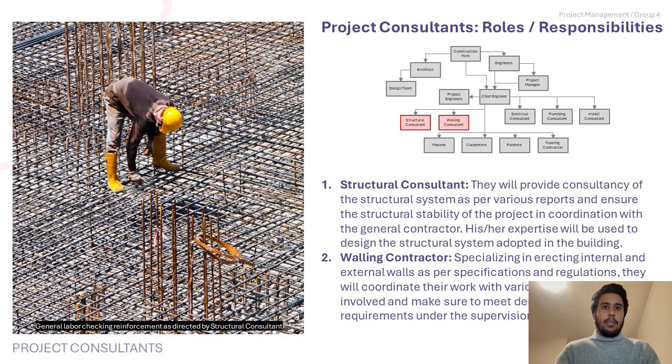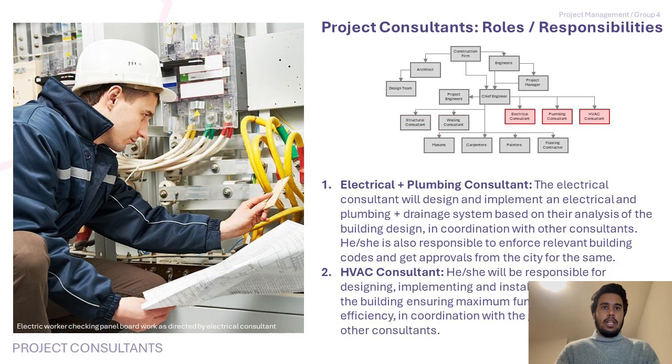The next important trades are the servicing consultants. Everything that comes under building services like electrical, plumbing, HVAC, all of these consultants are going to be responsible for designing, implementing and installing the different service aspects of the building, and they are also going to make sure that everything is as per regulations and up to building code, and each of these individual people are going to be responsible for getting the permits and the approvals for their particular field of expertise.